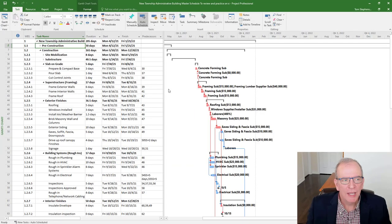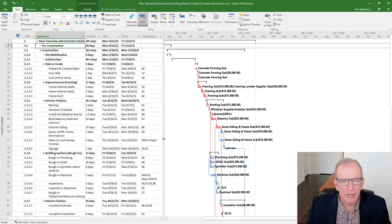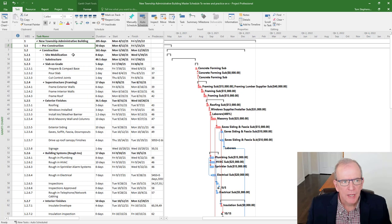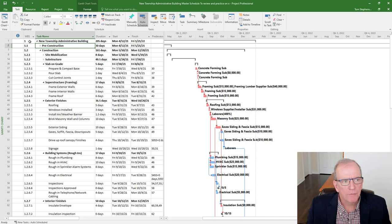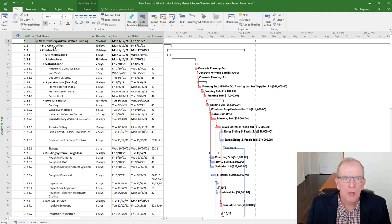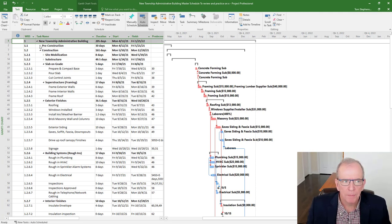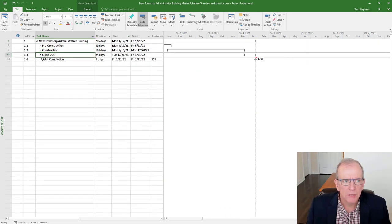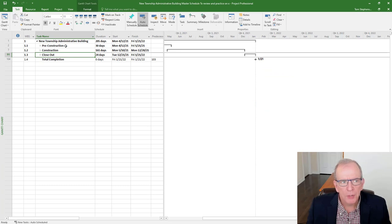Okay, we're here in Microsoft project. And I have this sample project of an administrative building up on your screen. And if you take a close look, you will see that I've got a sort of an overarching heading. This is what we call our work breakdown structure. Microsoft project calls it summary tasks. Like at a high level, I've broken it down into pre construction, construction and closeout. Very common headings.